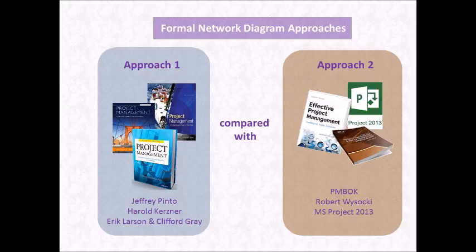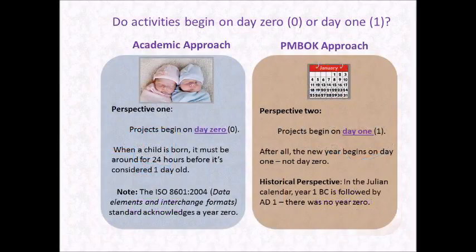The first approach is often encountered within academic settings, such as colleges or universities, as it is slightly easier to teach. Authors such as Pinto, Kirzner, Larson, and Gray will use this approach within their textbooks, while the second approach is shown within the PMBOK and used within MS Project. Both approaches give valid and consistent results. The primary difference between the approaches is how they deal with the start of the project. Approach 1, which I will refer to as the academic approach, specifies that a project begins on day 0.